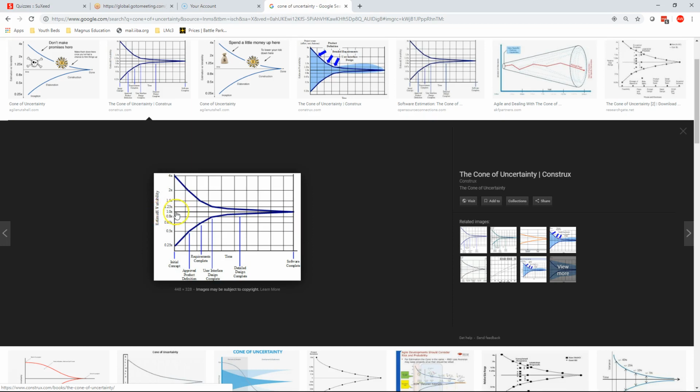So based on my baseline, if I'm in this initial part and I don't have a strategy defined, then I'm going to say it could take anywhere from 3 months to 4 years. And someone would go, good Lord, are you not more confident than that?